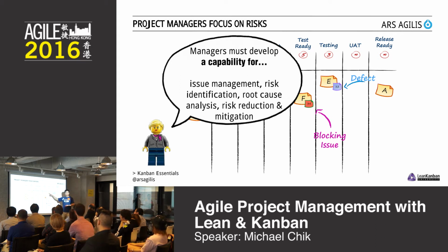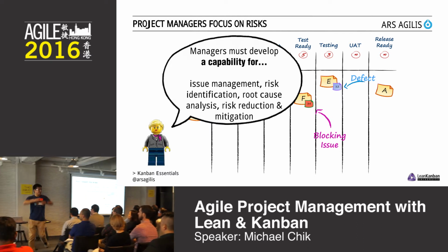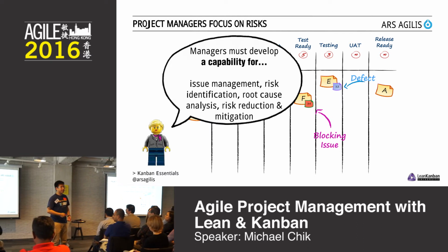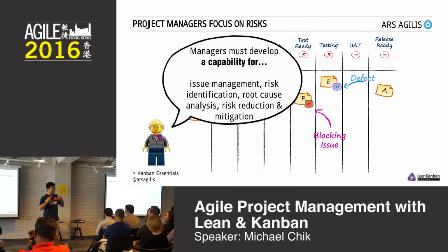If there's a defect, you put a defect on there, you create a new ticket. That new ticket does not go into your statistic. It's only for visual management. Because everything is inside this ticket. Everything is covered in here. So it just means that your big feature will take much longer to complete. That's it. And when you go back to the statistics, you will see that in your probability graph.